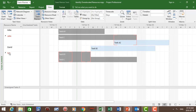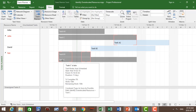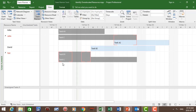For Sue, she's assigned to task B1 and task C, and you can see there is an over-allocation during the week of the 12th of February — Wednesday, Thursday, and Friday — and the week of the 19th of February — Monday and Tuesday.